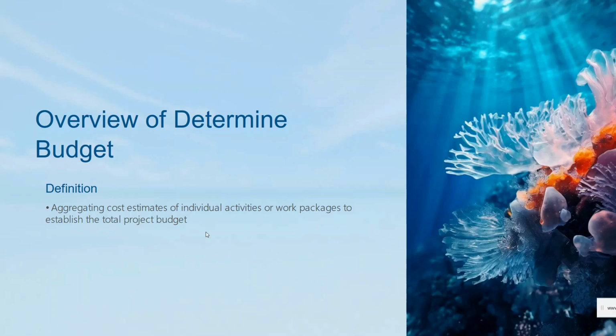This includes adding any contingency reserves, which we use for identified risks, and second, management reserves that we use for unforeseen issues or changes in the scope.